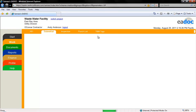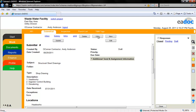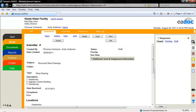You can see that this submittal is in draft form and has not yet been assigned an official submittal number. As long as your submittal is in draft form it can be edited or deleted. You can edit it by clicking the edit button. To delete a submittal, click the delete button. The document will be placed in the deleted items folder and can be recovered at any time.